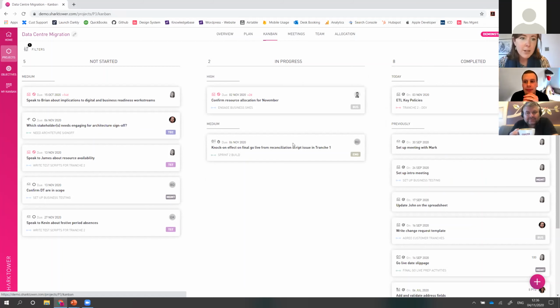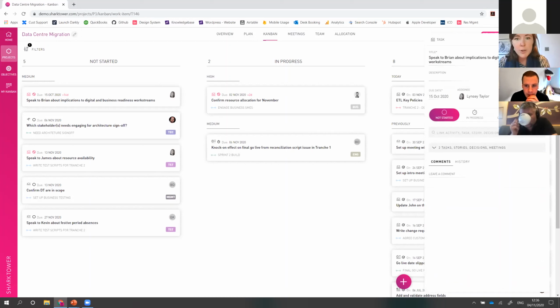So I might look at this one and say, you haven't even started this one. What are you blocked on? There's a blockage here, but you haven't actually linked any other related tasks. So can we talk through how I can help unblock you? What are the implications of you being blocked? Do we need to replan in any areas? Why is it 2 weeks overdue?